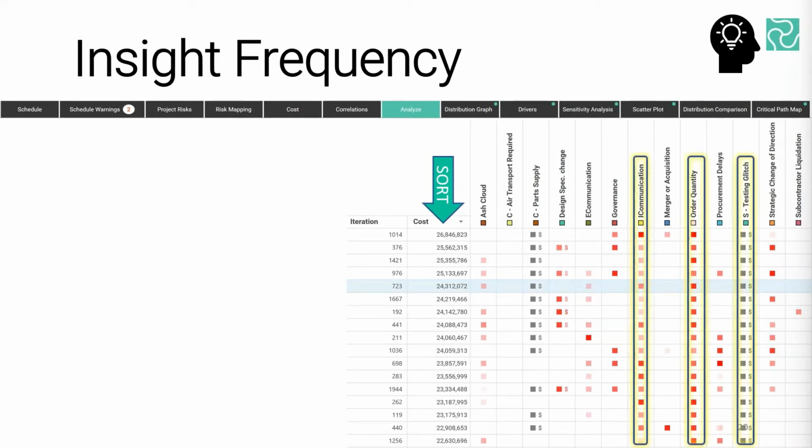And we can see that there's some patterns that are beginning to emerge, some risk scenarios that are typically conspiring together, and each of these iterations you are tending to push towards the statistical P100, or in layman's terms, the worst actual case position. And that in turn opens up new avenues of debate with your senior team. You know, if they want to sleep better at night, how do you decouple those free events like X, Y, and Z? Is there a way of doing it? And if there is, is it even cost effective to do so,